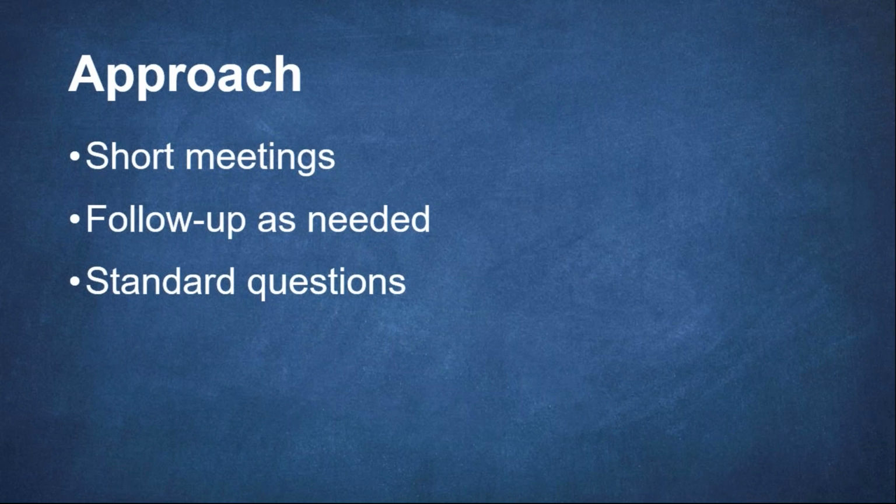And I prefer one-on-one meetings initially, because when you interview people in a group, you tend to get a bunch of nodding heads. And I need candid feedback. Candid feedback is one of the most important things when you're trying to discover what it is that they really want to accomplish.